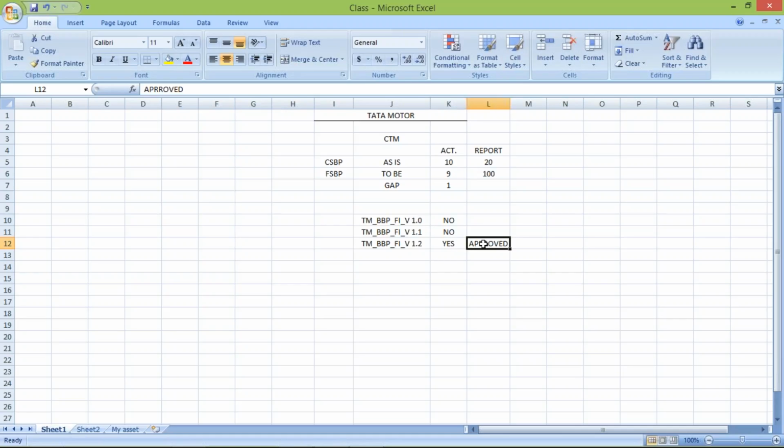So now I'll tell you guys about a question recently asked related to this, why I added all these things. This question was asked by Infosys people recently: which version of the blueprint did we send to the client for sign off? Now what happens, guys, whenever this blueprint is approved by the client, immediately we take the printout of this blueprint and produce it before the client, and we'll say that now you need to give your sign off, in the sense signature. The project manager from the client side is going to give his signature, the core team member from the client side is going to give his signature, the senior and junior consultants from Weber technology side will also put their signature, and the project manager from Weber technology is also going to put the signature. So 4 or 5 people will be giving their signature.